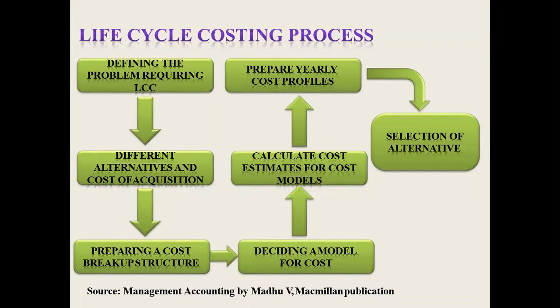Then preparing a cost breakup structure. Okay, so cost breakup structure. So we have studied work breakdown structure, how the work is divided into small categories. Is it right? Similarly, how the cost is broken up into small segments, that we can easily prepare.